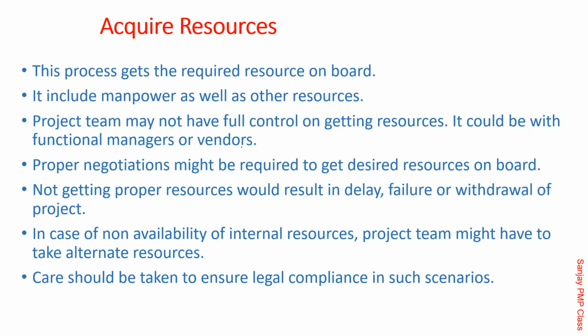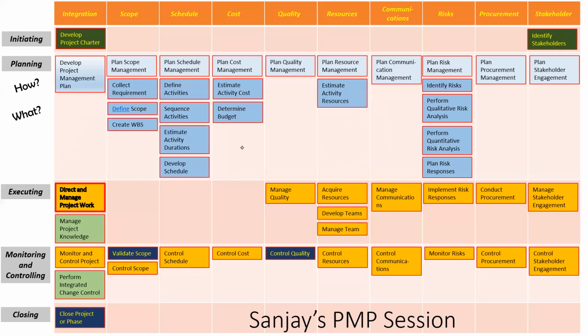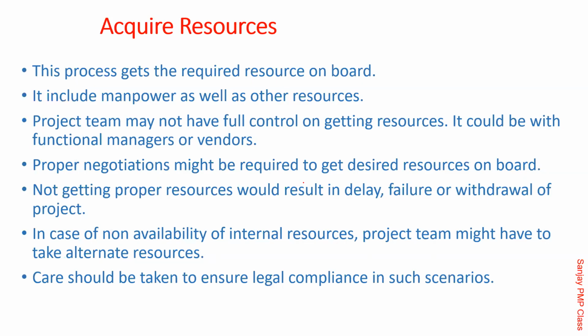Then comes acquisition. Once the people requirement is given, it's time to acquire the people on board. If you want to see the overall picture, we did this plan and now we are here: acquire. It is the process to get the required resources on board, and it includes the people as well as other items like raw material, consumables, tools, machinery, laptops, everything. All of that comes under acquire.